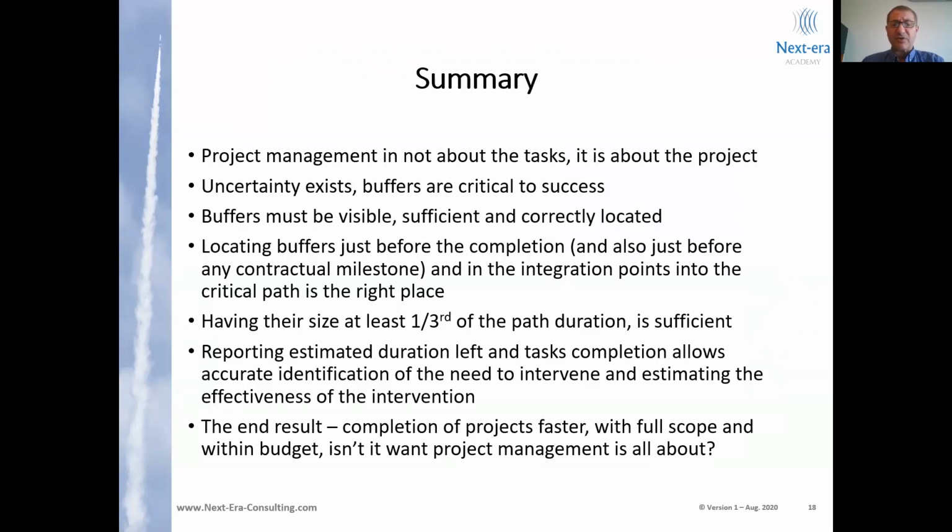So, to summarize, project management is not about the tasks, it is about the project. We cannot ignore the fact that uncertainty exists. Buffers are critical to success. Most project plans commonly do not have any buffer inserted in them, at least not visibly. Buffers must be visible, must be sufficient, and must be in the right place. Locating the buffer just before the completion or before any contractual milestone, and just before any integration point into the critical path, this is the right place to put it. Having the buffer at least at 1/3 of the path duration makes the buffer sufficient.